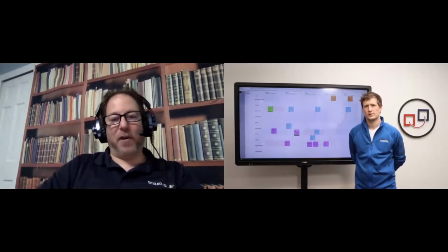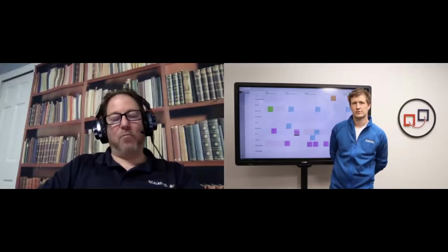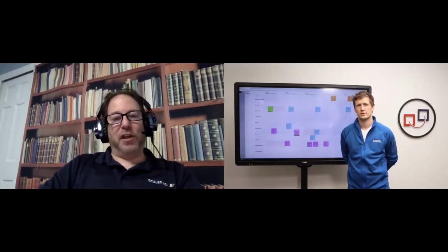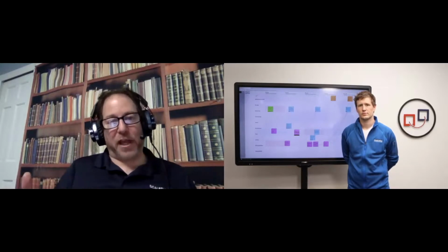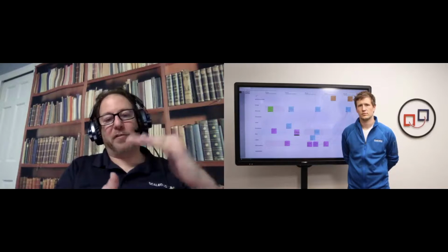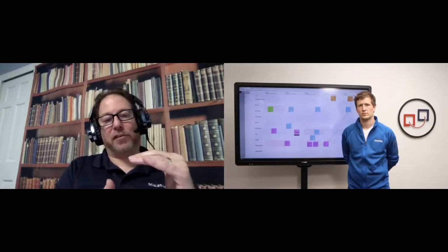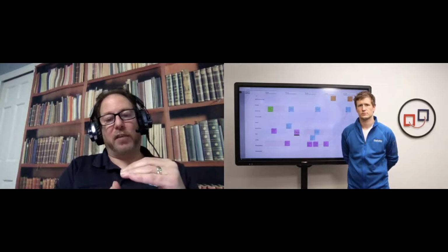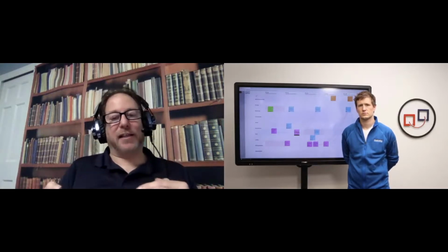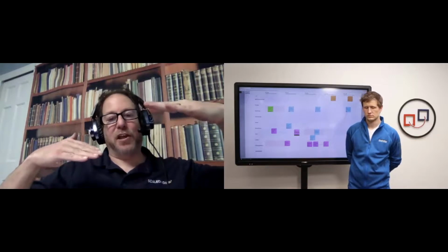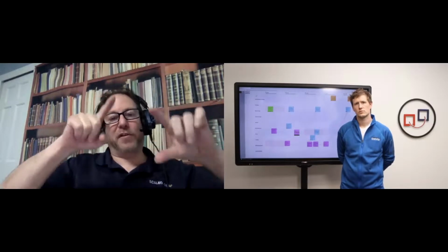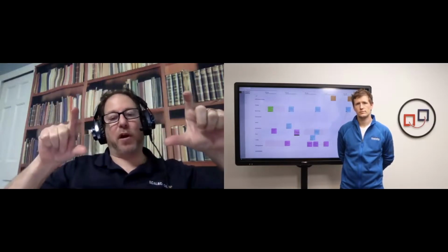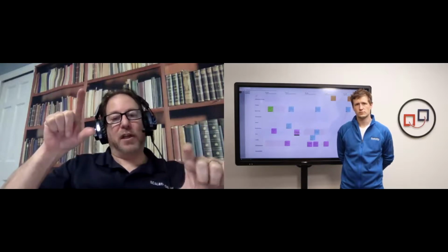Yes, so I think we could both speak to this one easily. And again, when you have people in different time zones, you need to create an agenda that is over more days, like 3 days, and look for overlapping periods of time. So when you're doing your team breakouts, you want the team breakouts being done in the US and let's say China at the same time. If they're in different places, there's no time for us to synchronize. So create an agenda with all the different items in the different time zones and make sure that the different groups in the different time zones can speak to each other.